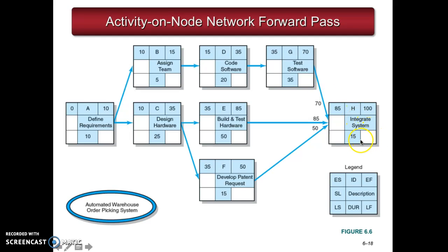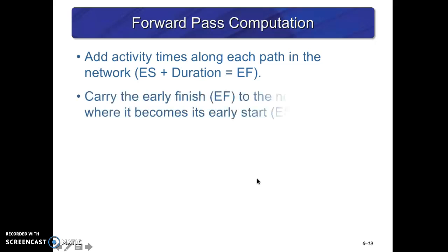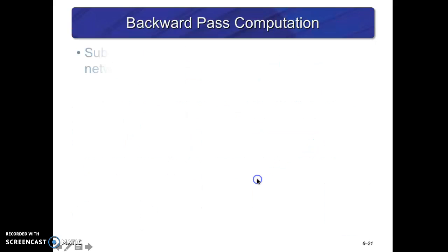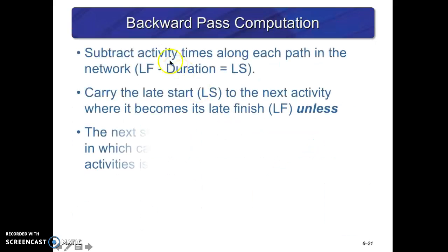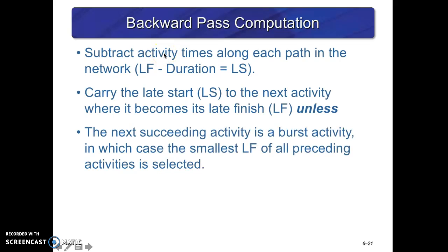And later you're going to do the backward path to figure out your late finish and late start and your slack time. Now let's show you the backward path. The backward path uses the same logic as your forward path, except you are using subtraction instead of addition.